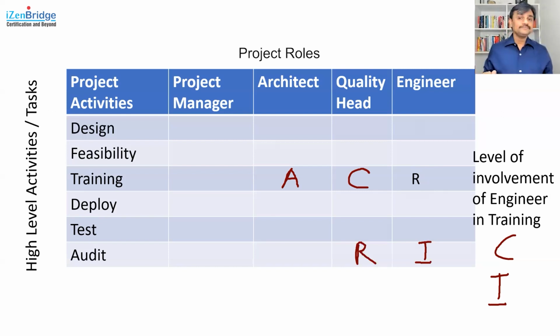In our PMP exam, this can be used at various places. The best or a common place where it is seen is a resource management plan, where we want to have a clarity about roles and responsibility of various team members. So that could be one place where you can use. You also see RACI Matrix emerging in a communication management plan to clarify who communicates, what kind of communication, where and how. So it can be used there. Many times RACI Matrix is also used at a contract level to clarify the role of the provider. If you have a multi-party contract, all those parties may come as a column and various activities and various decisions, and we may need to clarify with the help of RACI Matrix.